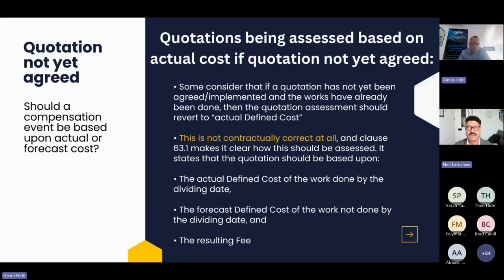Yeah, absolutely. And it takes me back to contractors' assumptions as well, that if the effects are too uncertain to be reasonably forecast, then the project manager should state an assumption. So if that's what's getting in the way of the assessment being done, the PM should bring clarity to the situation. And it's back to that whole ethos of proactive management.